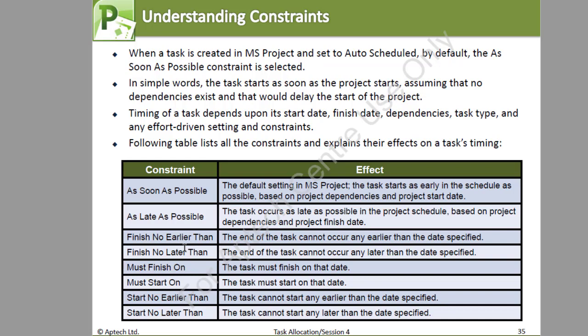These two, that is must finish on and must start on, they are quite rigid, meaning that some given event must finish on a given time or must start on a given time. We must finish cooking food by 1 hour or 30 minutes prior to the first guest arriving.